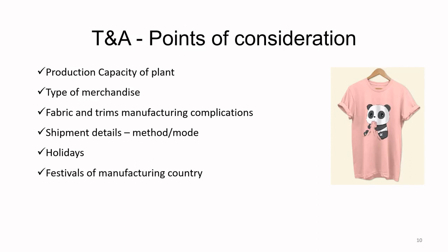So your accessories will come to you with a delay of at least 14 days. So it has to be taken into account. And if you know that the Chinese festival is going to fall in between, then you have to tell your buyer that the accessories will be delayed by at least 14 days, and therefore you will need more time to deliver the goods.